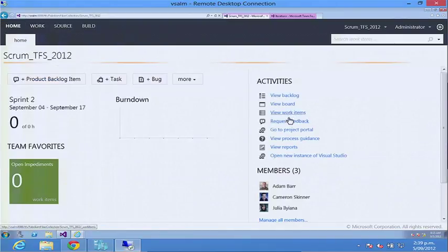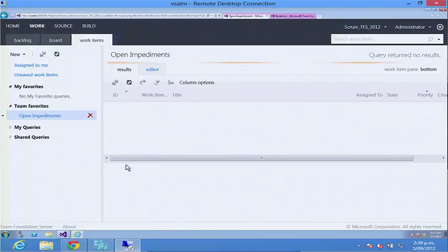So now when I go to my home screen, you see I've got this new tile showed up, which is team favorites. And I can add queries, builds, a whole bunch of stuff in here. And it's this dashboard idea of what does my team care about? Maybe I want to add work in progress. You know, I want a Kanban style WIP limit implementation. You know, we should only be working on 4 things at once. So we'll add that query of work in progress on here. And that means when I come to the home page, maybe there's a few things in here, I can just click on the tile and it's going to take me to the results of the query. So just handy things your team can customize for themselves to work out what's important for them.